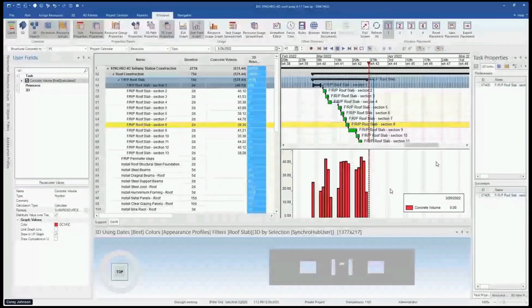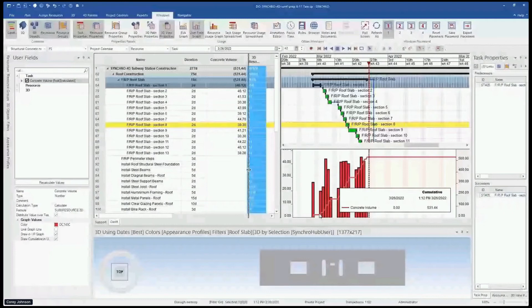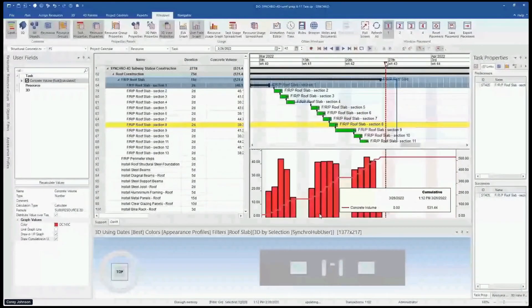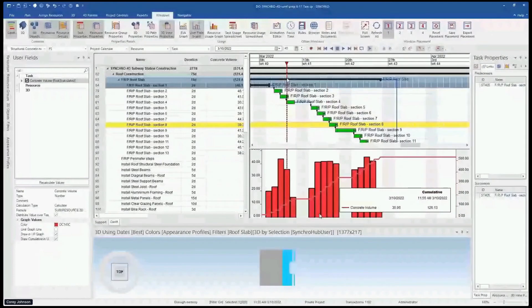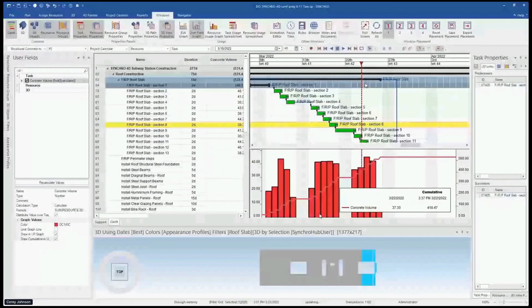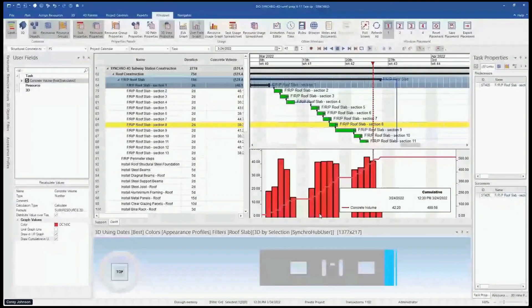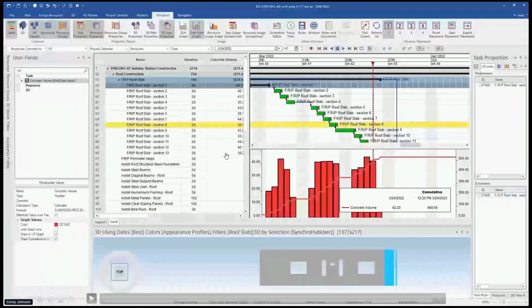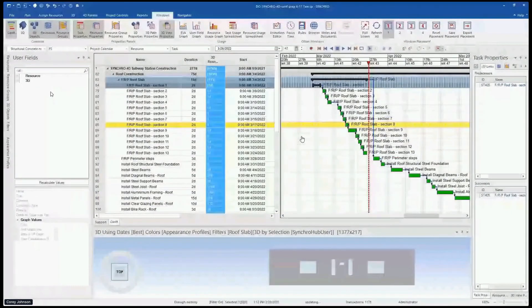And the important part is once we start to drive this and you see the quantities, we can actually see the quantity growth. Tie in your cost to this - now you get your earned value chart right here, which is very important. A lot of folks can do this, but we can tie it to the model. So we broke it down, we added our cost code structure, we put in our production rates, we put in our costs, and we know the duration. So this is excellent information. But let's take it a step further.